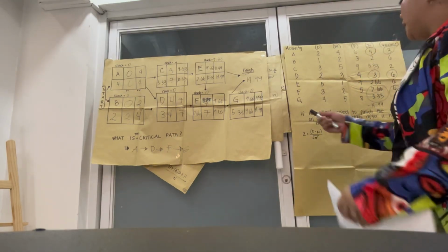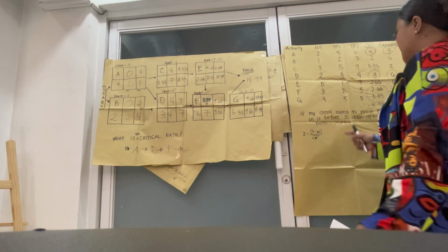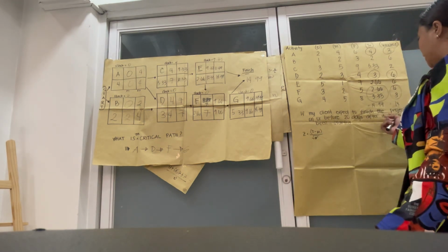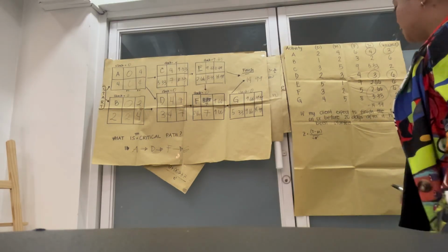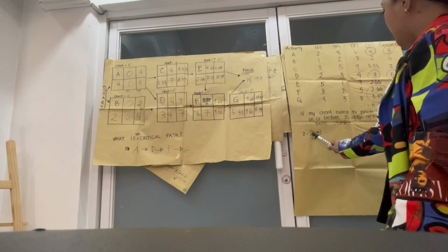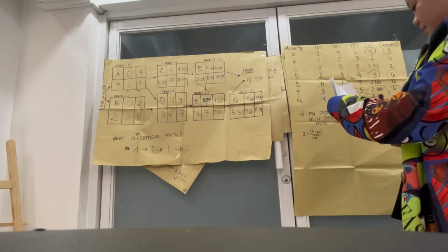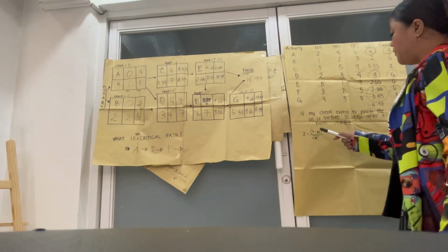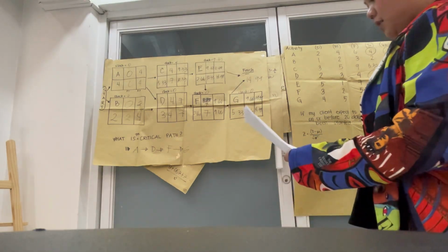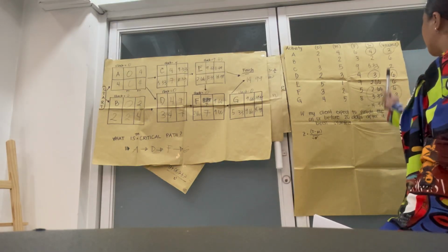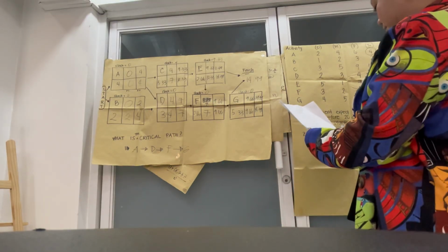So if my client expects to finish the project on or before 20 days after it has been started, what we need to do is compute the Z, which is the division of the difference from the total of the expected time.